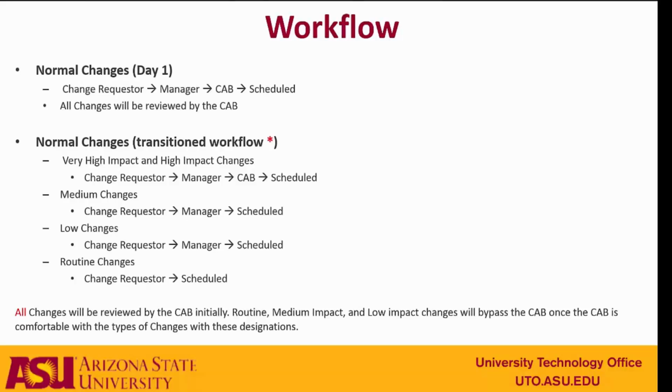Change management will have a workflow, meaning that some changes will require approval. When we started the pilot, every single change would have to go through the entire process: change requester, manager, change approval board, and then be scheduled. As we're starting to make sense of all the different types of changes that we do in this new system, some changes will still require that.